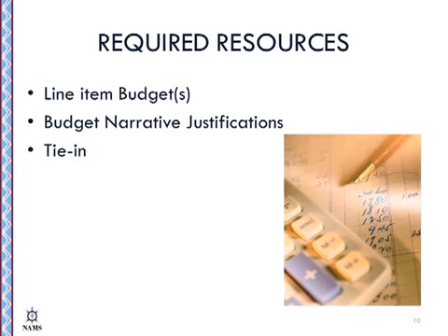proposed project. Provide a detailed line item budget that displays the federal and applicant matching share budget for each year of your project. ANA requires a 20% applicant match of the total project cost. In other words, the ANA share of project cost is limited to a maximum of 80% of total project cost.